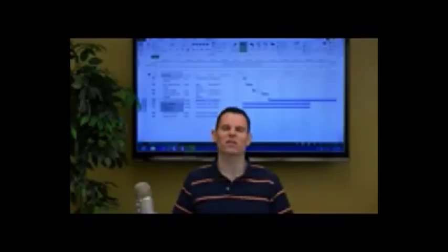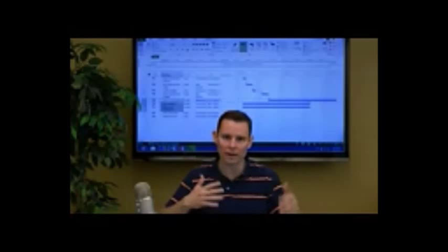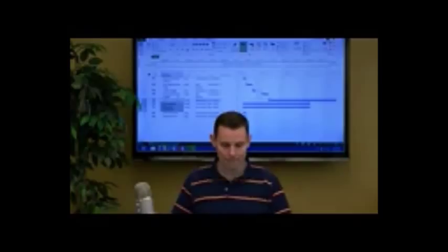Then these next three are kind of tricky, but just pay careful attention to what I'm doing here. I think you'll get it. First, you have to have the boss approve the budget before you rent the space, so you link those. And that pushes the project out quite a bit now. Now we can realistically see how long this thing's going to take. And these three things can happen simultaneously, in parallel, right? You can rent the event space, hire the caterer, and rent the equipment all together. You don't have to have those done before the other, typically.